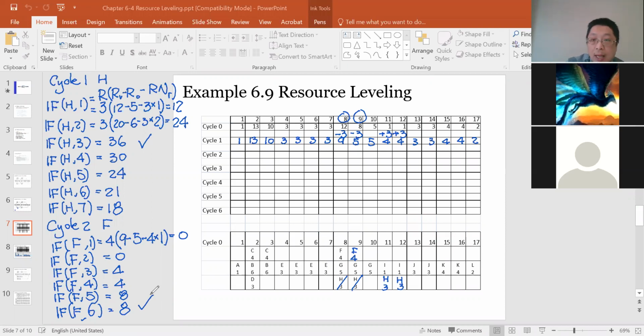Professor, would that be the case if, for example, we were doing C before F? Would you still want the furthest one? Oh, this is a backward method. We have to do F first, then C. We need to do the later one first and leave space for the earlier ones. Oh, because I thought we were doing cycles in the order of the LF.